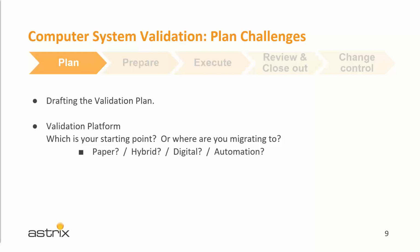And then last one, automation, right? This one has more challenges because of the time required to produce the scripts and to validate the actual scripts even when they result as pass, and maintaining the scripts in some instances. A key benefit from automation during maintenance is that if your scripts are maintained, and you expect no changes in many areas after a patch, for example, you can dry run the automated test cases even for low risk items with low impact on schedule.